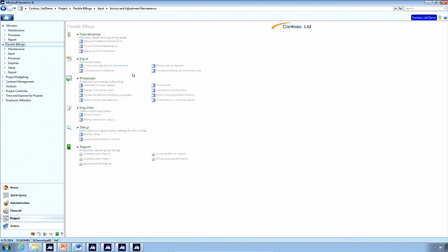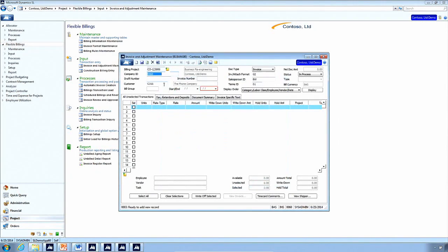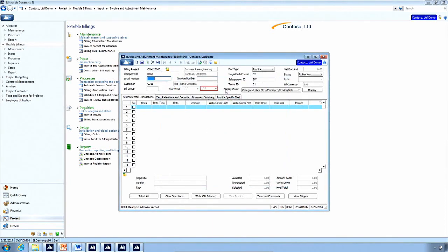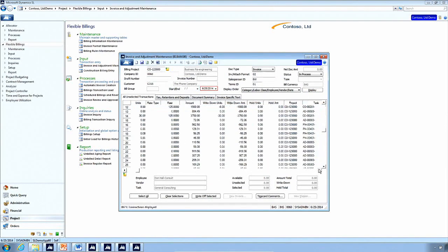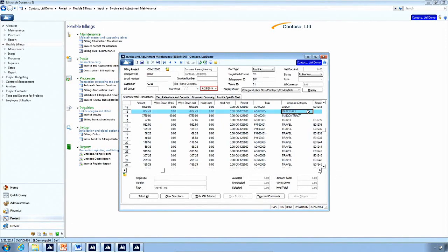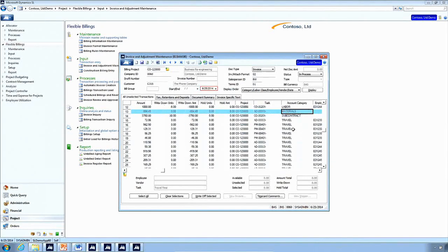And if I go back again, we talked about this invoice and adjustment screen becoming the primary screen for all invoicing. So I can come over here and it should generate a line for the difference. I have so many lines in here, but it will generate the lines for the difference. Here's the materials line here, 884.49. That was the line it created as the progress billings for the difference that I told it to bill for.